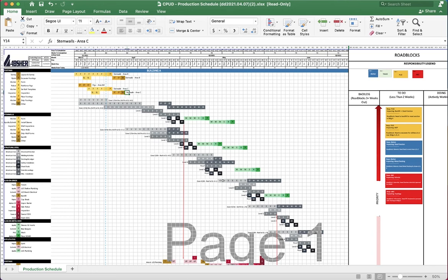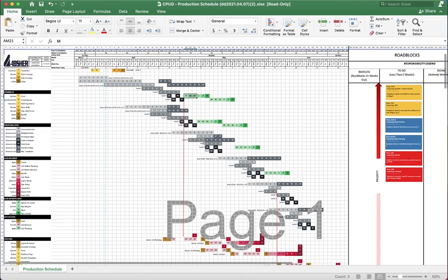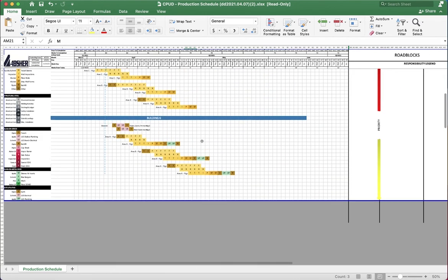I mean, you can look at this project and immediately see within the year exactly what's happening for all of these, and you can actually see the flow. So the one perfect example for the flow here is just even if you look at these green activities, right? So you see that there's some overlap. So the M's go down here to these other M's, right? And then up here to this second set of M's, let's see what that is. That's sleeves and inserts, right? So nice flow from activity to activity, right? The greens in and of themselves overlap, but the activities, the tack wagons within them do not, and they have ideal flow. You can see flow with this system super quickly, super easily.